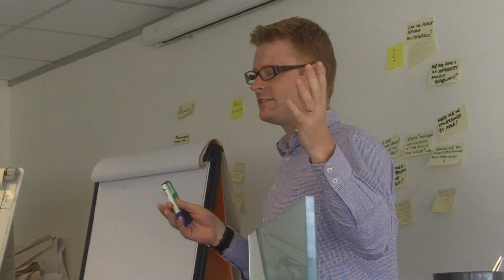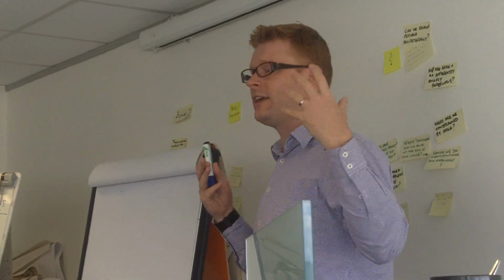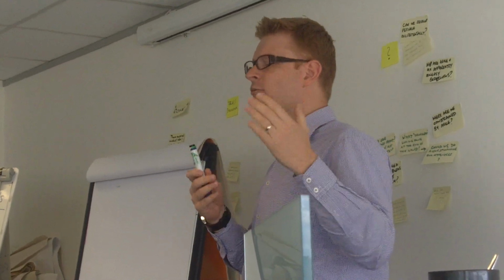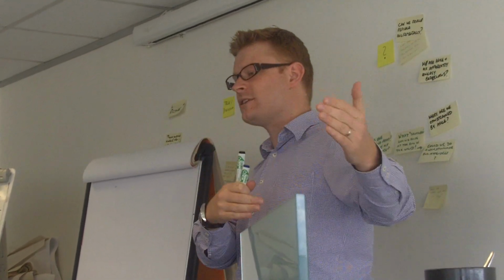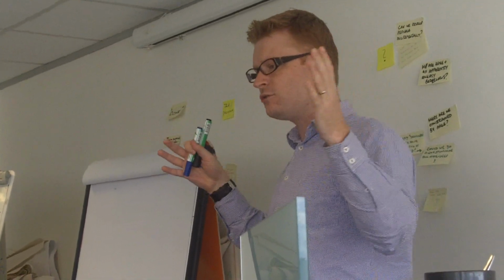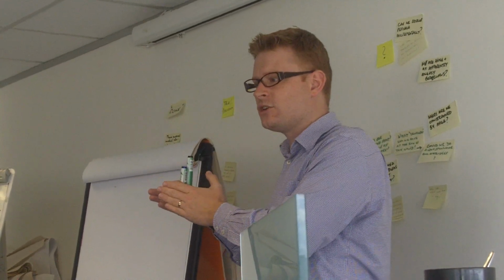So the wireframes that you designed yesterday, that are waiting for your client or your customer or your stakeholder to approve, are waste, because they're taking up your time and your energy and thinking, and not providing any value to your customer yet. Now, obviously, you have to do that, and in order to get something to your customer, you have to go through that process. But the idea is to minimize the amount of stuff that is currently outstanding as much as possible, and reduce the amount of time it takes to get something from, hey, wouldn't it be cool if we could do this, to deployed and live.